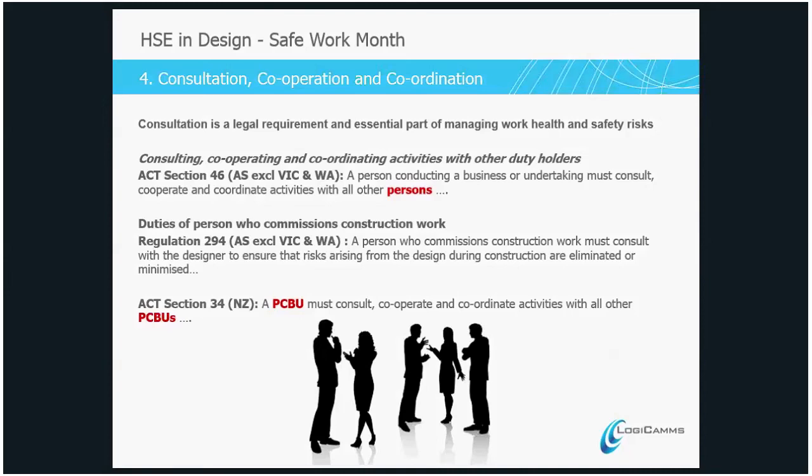Duties of persons who commission construction work. So if, as a client, you engage someone to do commissioning for you, under Regulation 294, a person who commissions construction work must consult with the designer to ensure that risks arising from the design during construction are eliminated or minimised. So this puts the emphasis back on anyone who commissions someone to do construction for them, that they engage and consult with the designer to understand the risks associated with that design.